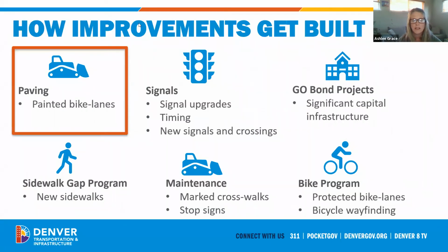So this, as I talked about before, we have our paving program. That's how this project has come to be, is we are paving Bucktail this year. And so we are working fast and furious to get this project designed so that by the time our paving crews get in there, we can have this design ready, and we will put this new bike facility in place as they are wrapping up their work. And so that's how we are able to fund this project specifically and so quickly.